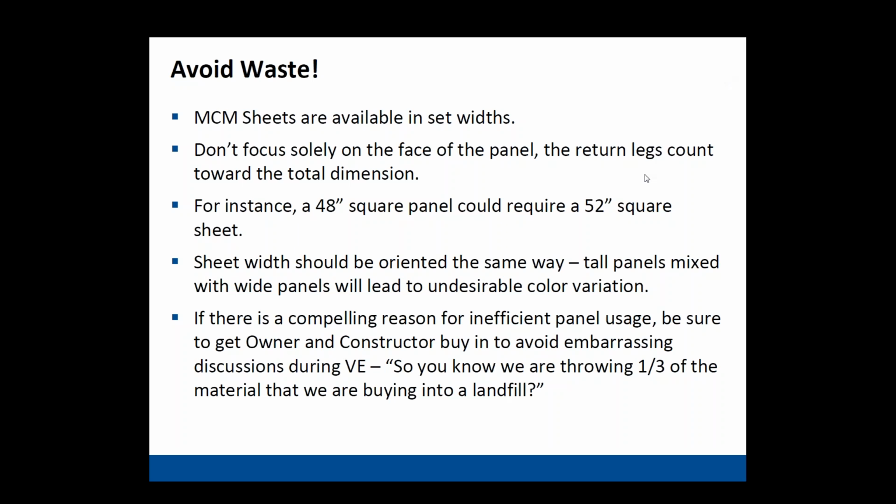Understand that if you're dealing with a project and you're fighting with value engineering, you don't want to be in a situation where the contractor is pointing out how much MCM you're throwing in the garbage because you didn't maximize your use of the sheet. Again, it's not a terrible thing or a moral failing for any of the architects to do this to achieve their design, but the owner, the client, needs to understand this too. The last thing you want is, in the VE session, to be made to look bad by a contractor saying, well, look at this. We could have done this far more efficiently if you hadn't used the module you're using. If the client understands the issue and is bought in, it doesn't matter. It's what the client wants. It's all about communication, and if we don't do enough of it, that can lead to problems. So, next slide.